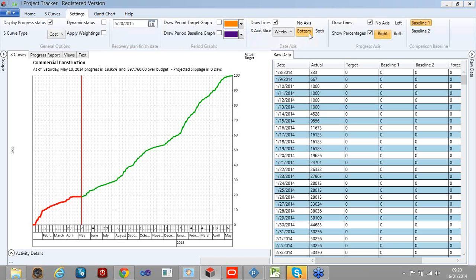Okay, another question: to be a user of Project Tracker, does the user need to have an installation of Primavera on their computer or not? If they want to import from the SDK, yes, but not if it's for an XER, no. It means that if I have no installation of Primavera and my contractor sent me an email with an XER file, I can open the XER file in Project Tracker without installation of Primavera.